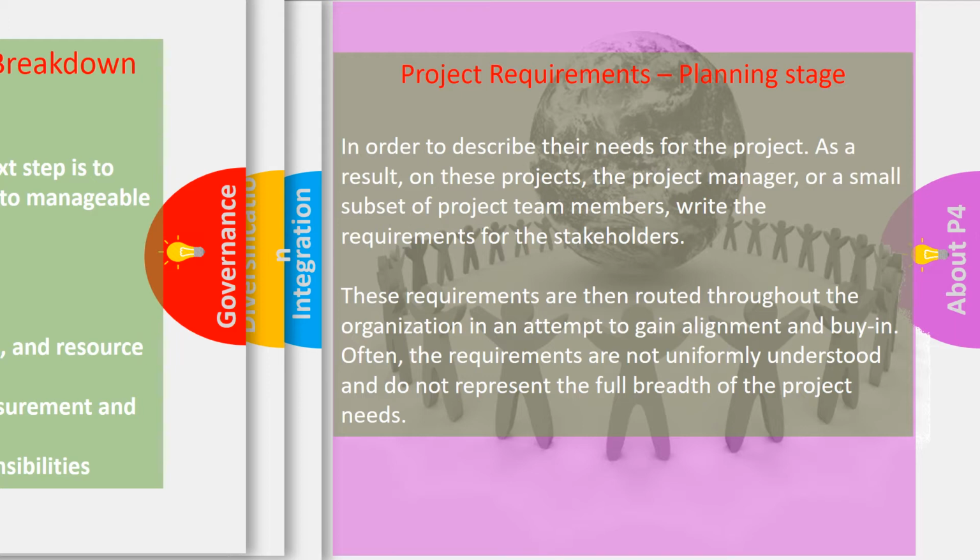You're not going to be taking into consideration time frames or budget. If someone asks you what your requirements are, normally you're going to ask for the best of the best, and you're not really taking other things into consideration, like the project manager would, to see if these things were workable and compatible. So how you get these requirements is important: get all the stakeholders into one room talking, let them hammer out exactly what everyone needs, and then come to some compromise and agreement.